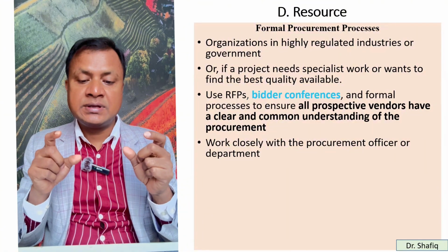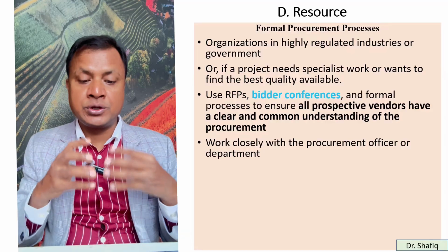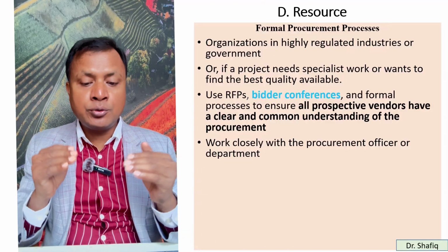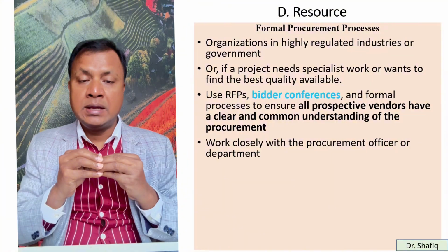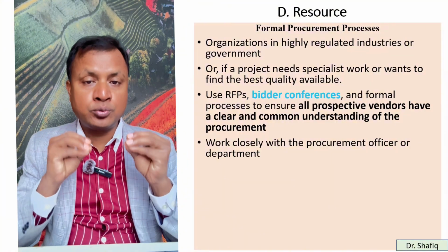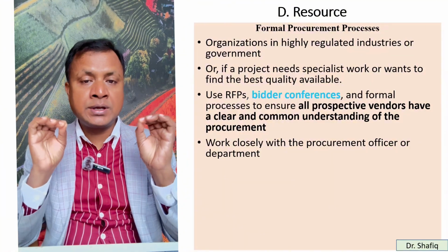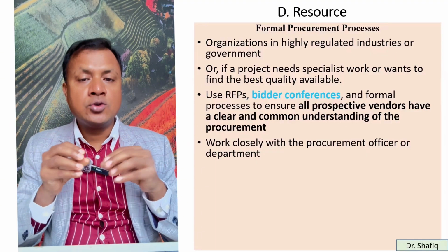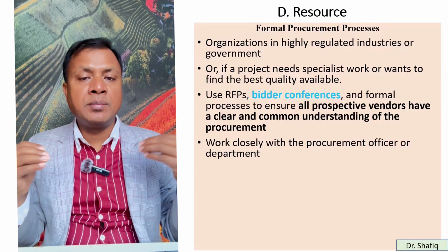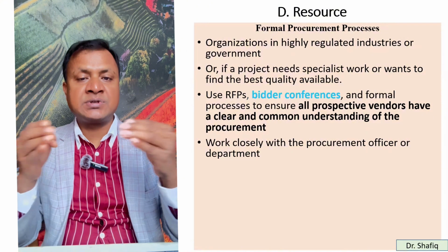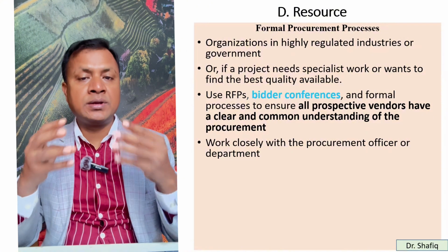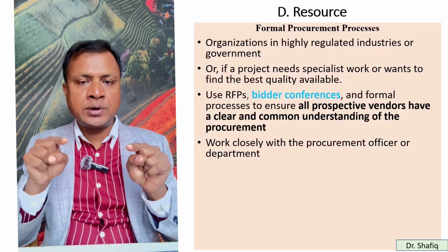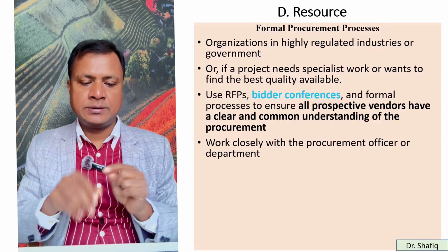Bidder conferences actually are a formal process to ensure all prospective vendors have a clear and common understanding of the procurement, because whatever we are going to procure is very tricky, complex, not done before. We cannot define it. So in this case, we can make a meeting with the prospective sellers or vendors who will be providing it to specify the specification of the product or team or resources.